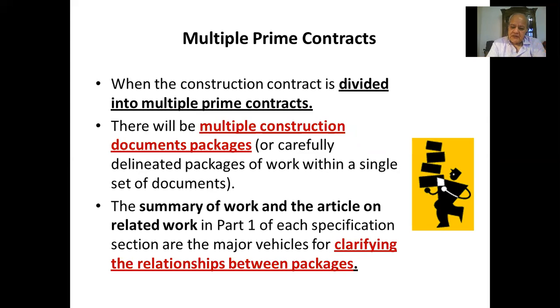So you need to understand from the beginning how the owner would like to select the contractors for the delivery of the project. It affects very much your packaging of the working drawings. So before you start construction documents, you have to communicate with the owner and make sure that he knows the delivery approach, and make, as I said, everything in writing.